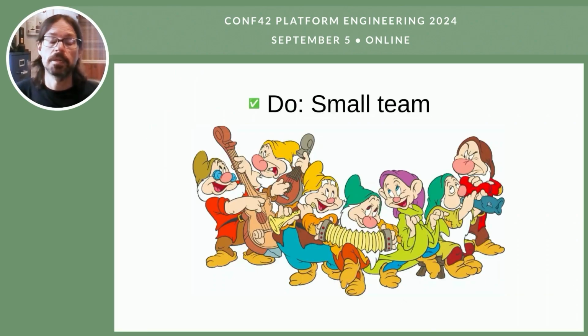First thing is it's much better to have a small team doing that, a small group setting, like pretty much all brainstorming techniques. The bigger the group, the less people will share. Also you have less time for everybody. It's time consuming if you want everybody to talk. So it's much better to do that in as small a group as possible.